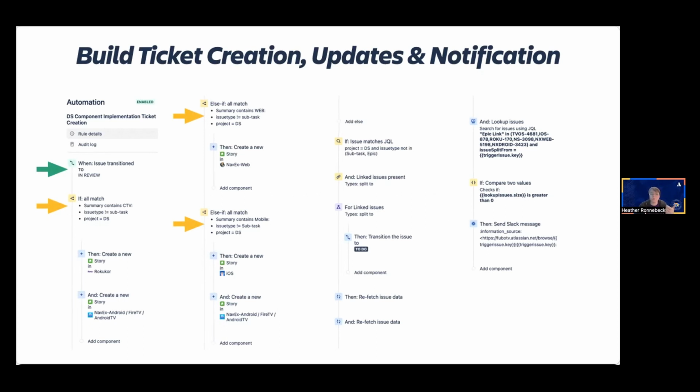The other thing is we only want tickets from the design project, not from all the platform projects that this rule will create tickets on later. That's why the filter is applied here. If the story matches one of these three if statement components, then the tickets were created in their respective branches.